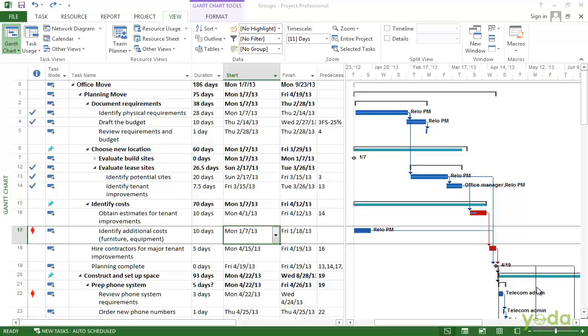Grouping helps you categorize the tasks, resources or the assignments. When you group items, the summary rows for each group roll up values for all the items below. For example, if you group the tasks by the team that does the work, you can see how much you are spending on the labor for employees, contractors and the third-party vendors.